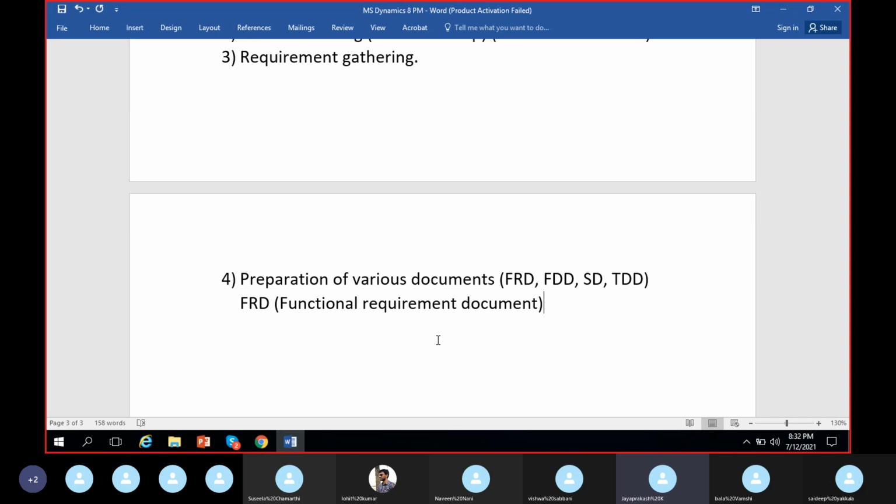Once you have agreed on all of this, that will take some time initially in a project. Once every requirement is gathered and the documents are prepared, you will get them signed, so that for now you have agreed to implement this much only for the client. If they bring up anything additional in the future, you can look into whether it can be added into the promised project cost, or if it is additionally chargeable.